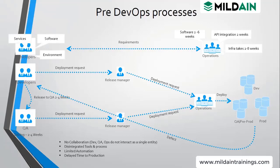Everyone has their own processes and those processes are not integrated with each other. Most tasks are manual with limited automation. The impact of this is delayed time to production. A request comes in, gets developed, takes time — and by the time it is released to the customer, a new change has come because of market changes. Then changes have to be made again, so it is not faster to market.